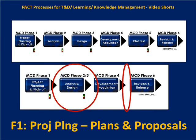In another example, we combine phases two and three and also skip the pilot test. We maintain the phase numbers even if we skip a phase — so someone might ask why we're going from phase four to phase six; it's because we've made a deliberate decision to skip the pilot test. If we've done 27 similar projects and the client feels confident, we can develop, release, and deploy content directly — to the LMS, LCMS, or file cabinets. The client may deem the pilot test not worth the effort given low risk. The flexibility can be maintained; pilot testing is a best practice most of the time, but as always, it depends.